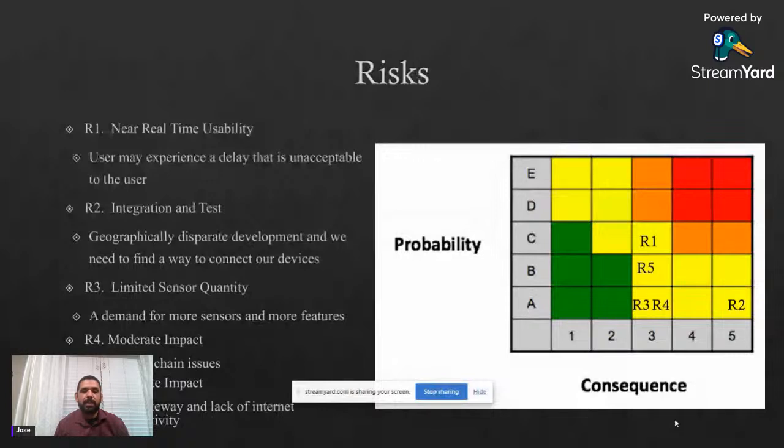So that could affect us, especially as we start to scale and produce more of these devices and these sensors. But also on the app side, there was a risk: if it's not connected to the internet, then there is no internet connectivity to back up your data to the cloud and restore data from the cloud. But then again, this risk is mitigated by being able to process the data and the sensors offline and store it on the phone in a SQLite database, which has been implemented.